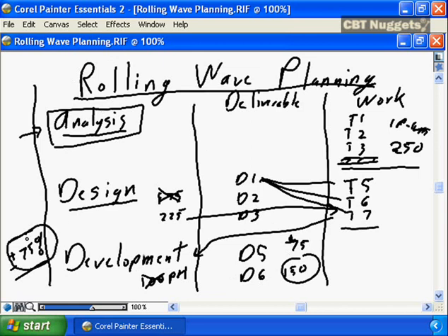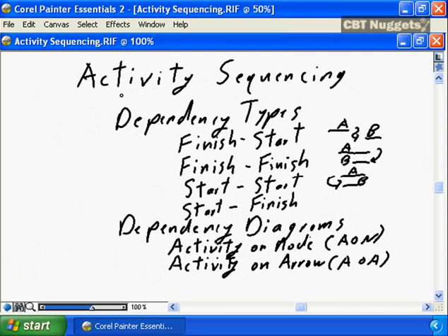So when you use a rolling wave planning process, it's important that you define your level of confidence, so that when you're presenting the total project picture back to senior management, back to your business sponsor, they understand that this is not a firm, fixed estimate for the total project. It's simply a firm, fixed estimate for the next phase of your rolling wave, and best assumptions, and I'm going to use the term best guesses, for the further out phases of your project, and you're going to present your level of confidence.